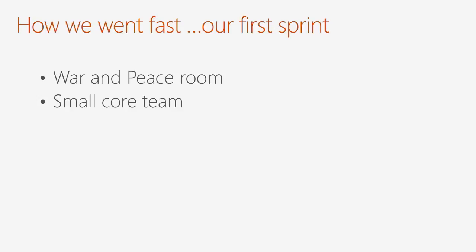We used a small core team. There were about 6 people, and we brought in other resources for parts of sprints as we needed them: network guys, firewall guys, load balancing guys. And we did a really radical thing.